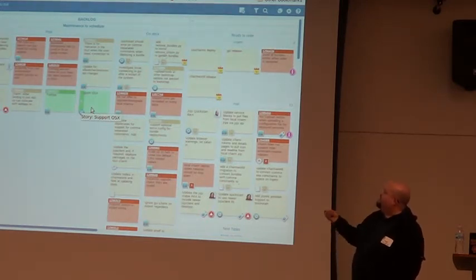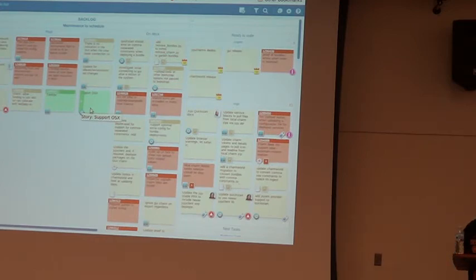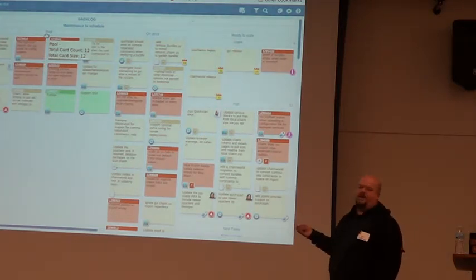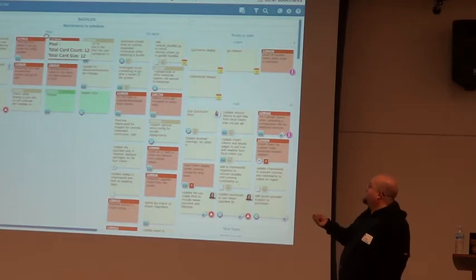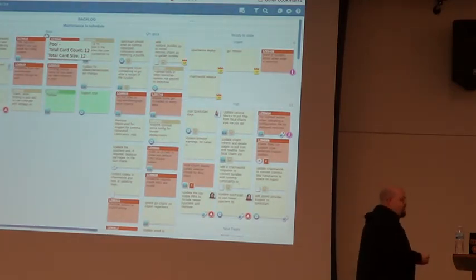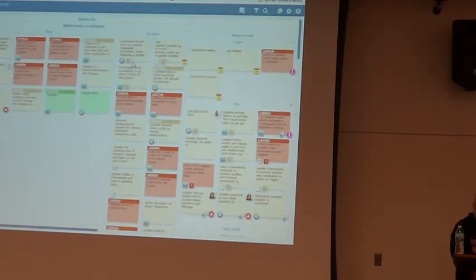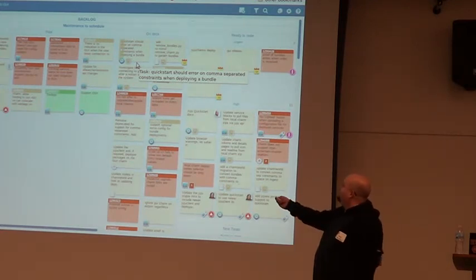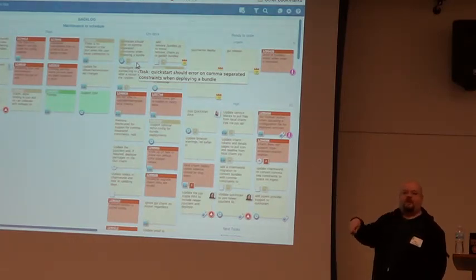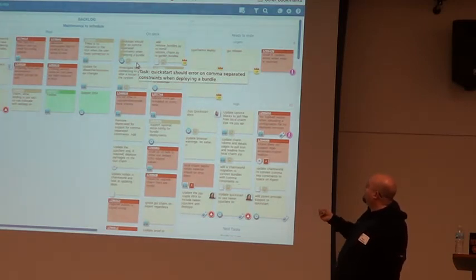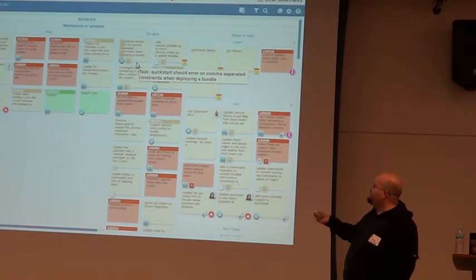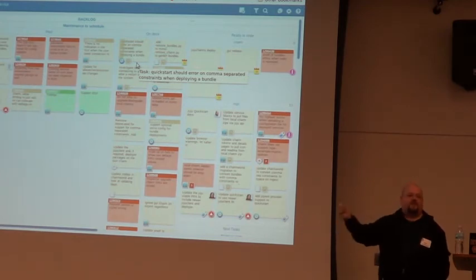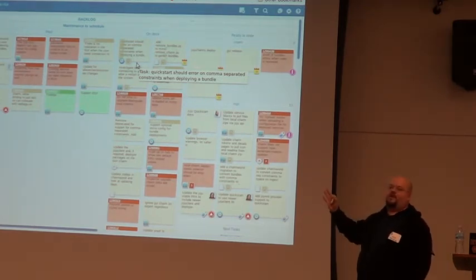And so the red cards are the bugs and the yellow ones are just tasks. And so these are all the things we'll sit down. So in the pool, we've got a two week window. So the pool is things that we're not going to get done right now in the next two weeks. The on deck is what we're going to actually run through for our planning poker session. So we'll go through and we'll put numbers on everything on Friday in here. And a few of them have numbers. So what you'll see is that. So like these ones at the top, they were in the planning poker session last two week cycle. But they weren't deemed worthy of priority to be pulled across.